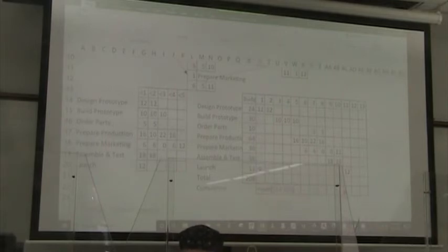All right. Now, it gets a little bit trickier after that, because we want the cumulative total, so that means equal to the previous week plus the summation of the totals spent in week 2. Right?